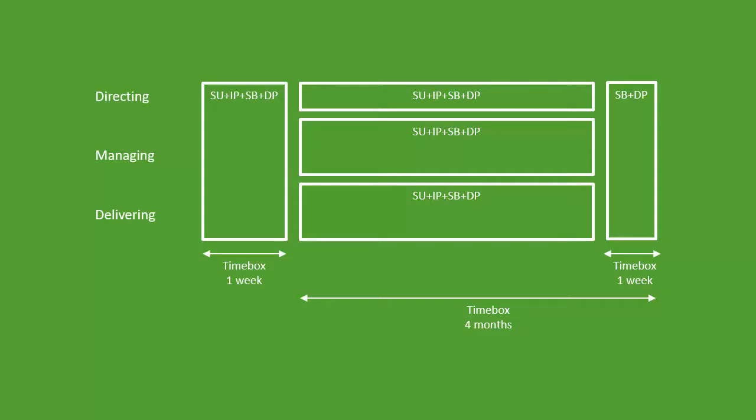On the next level, on controlling a stage, the product management level, that's where we collect things into releases. So when X number of teams have sprinted 4 times, in this example, we collect that into release and we make sure it hits the end users so they can start using it. And this would be taken care of on the product management level. So it's a time box to make sure that we're actually producing something worthwhile, we're getting some feedback from the